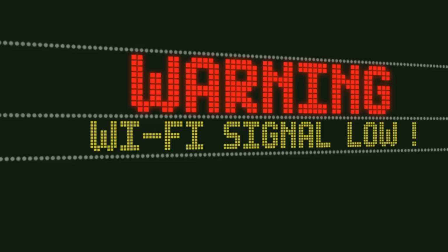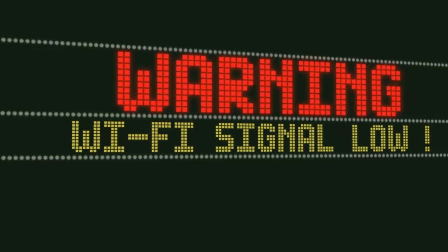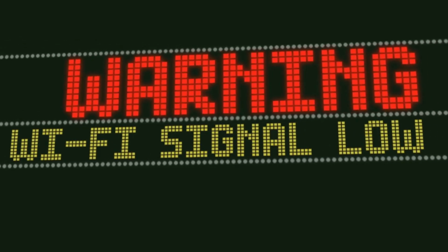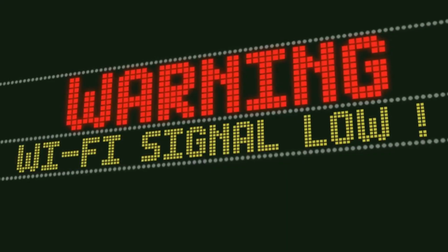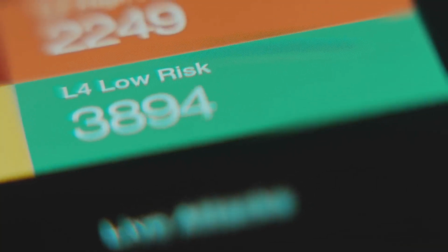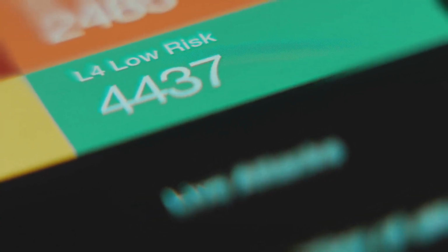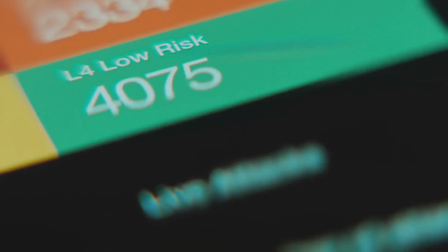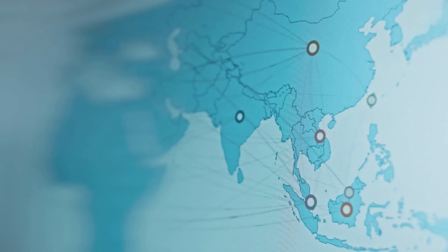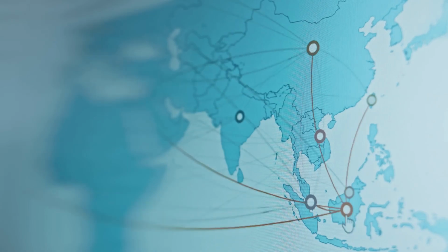For instance, imagine an AI designing a network for a dense urban block. It analyzes GIS data and discovers underutilized old telecommunications ducts. A human planner might have missed or skipped that. The AI quickly designs a topology that routes 70% of the required fiber through existing ducts. This avoids digging up busy streets, which would have required expensive permits, traffic management, and night work. The AI presents a handful of optimized route plans, each with a detailed cost breakdown and a list of potential construction challenges, allowing the human design team to make a quick, informed choice.